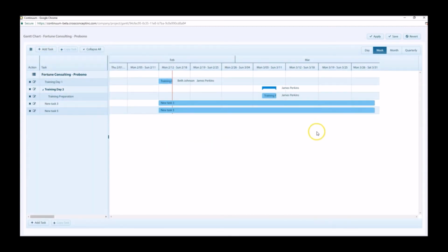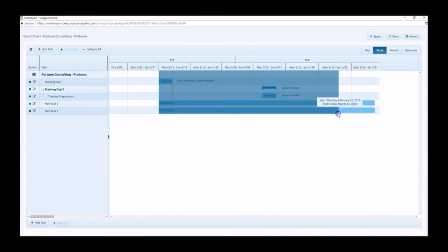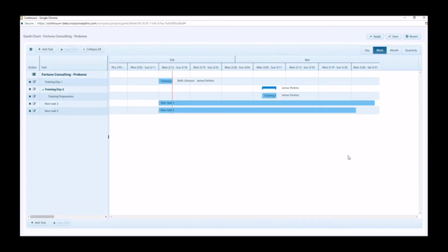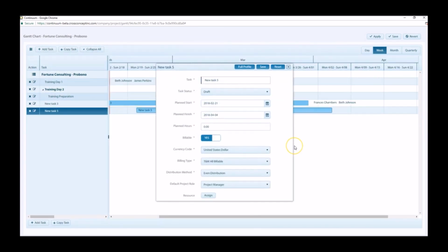From the graphical interface, we can click the border of a task and then drag the mouse to extend or reduce its duration. While dragging, the updated start and end dates appear as a reference. By releasing the mouse, the interface updates to reflect the new values. We can also move the task without changing its duration by dragging the actual bar to another location in the calendar. By double-clicking a bar, we can also access the Quick Edit dialog box we already reviewed.